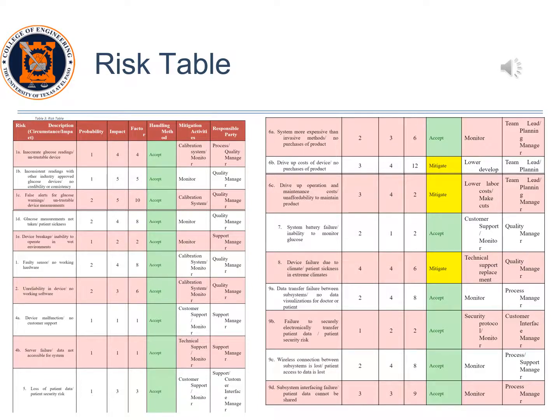By observing the risk matrix in the previous slide, exposure factors, probability, and impact, the best mitigation handling methods for each risk description can be determined and a mitigation plan can be created. This table shall be observed weekly to monitor any changes that may occur to each risk listed in the table. The table describes the risk, details the risk parameter values, handling method, mitigation activities, and the person or persons responsible for the activity and risk.